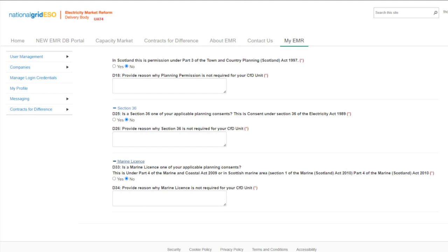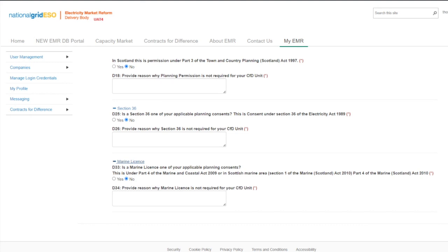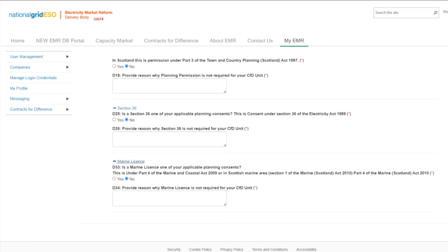As a reminder, the delivery body will be performing checks on each section where planning consents have been provided. The Schedule 5 checks will be undertaken. This involves checking the location for the proposed CFD unit. The delivery body will check the capacity in the planning consents is equal to or more than the initial installed capacity estimate of the CFD unit specified in the application. They will also check that the application date is before the date on which the applicable planning consent expires, and that the technology specified matches the application.